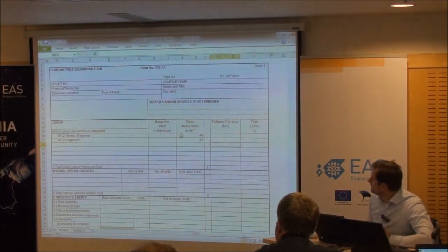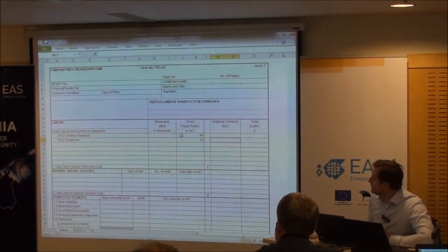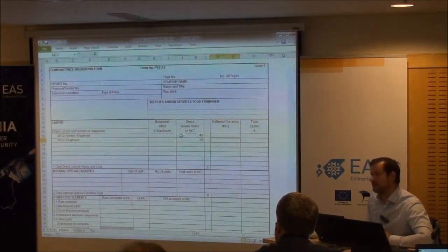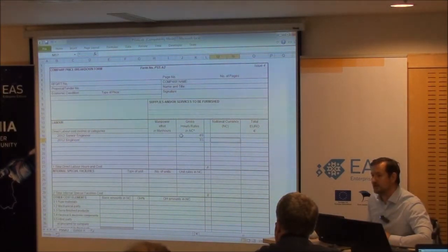So we've put our rates in. You've got a nice easy one here because you're also trading in euro, so you've got no currency exposure. If you were outside of zone or you need someone outside of zone, do think about that. Depending on the currency, this can cost you. The bigger the job, this can really cost you if things change.